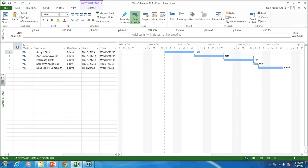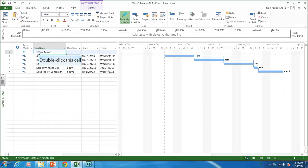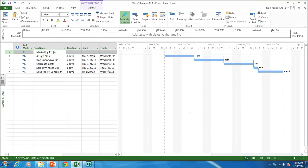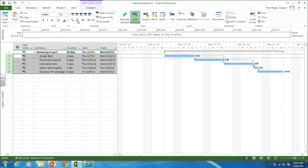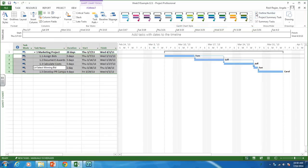The first thing you're going to want to do is enter a parent activity — the overall project parent activity — so that we will have summary information on this project. Right-click, insert task, and call it 'Marketing Project.' It is a parent activity representing the overall project, just like in your deck project you'll have 'Deck Project' as 1.0. Make sure everything is indented under it and click the outline number to get WBS codes, so you can see that the marketing project is the overall parent summary activity and all tasks fall under it.